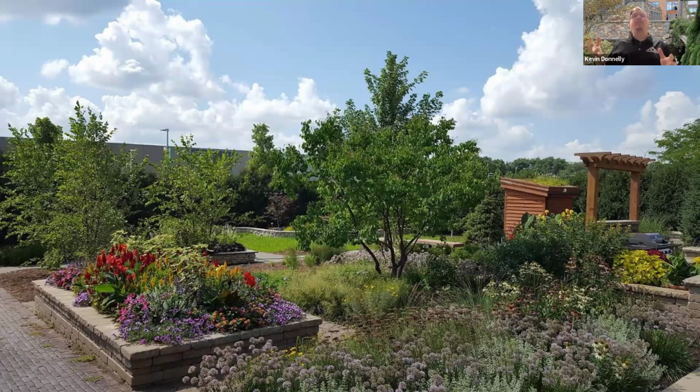And again, there's a lot of attempt to value engineer things at the end, because there are cost overruns and there are issues with it. And soil is usually, like I mentioned, the last thing, the forgotten thing. We've often been contacted saying, hey, the project's not been approved yet. The soil has not been approved yet for the project. But on Tuesday, the general contractor needs that hole filled so they can move on, in which case there's often a time of making exceptions and everything else.